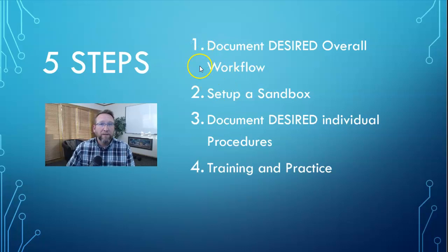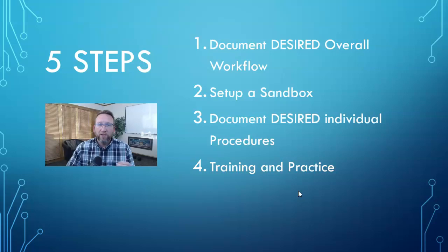And once we've completed steps 1 through 3, we're ready for training and practice. Training and practice should strategically be scheduled right before go live. If training and practice happens too far ahead, then training will be forgotten before the go live date. So training and practice should always happen just a week or 2 before the go live date. And we should do everything we can to prepare for successful training and a successful go live, which is step number 5, go live. So let's go through these 5 steps.